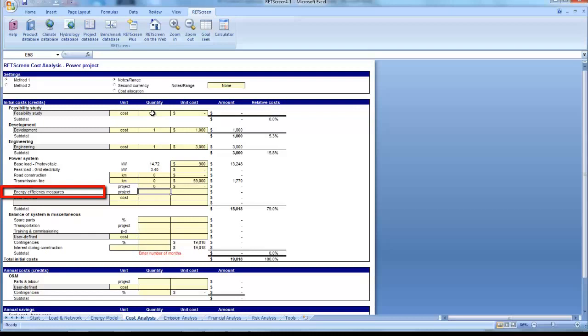Energy efficiency and conservation improvements are easier in California, where space heating needs are very low. Assuming the implementation of thermostats, measures with air conditioning, lighting, water heating, and considering the government incentives in place, we will assume that $1,000 will be appropriate to make the energy efficiency upgrades necessary to reduce the electricity load by 30%. For this study, we will assume 3 Orion prefabricated carport units.